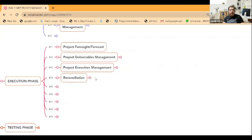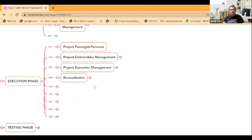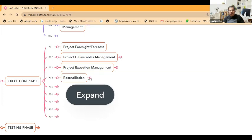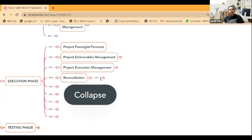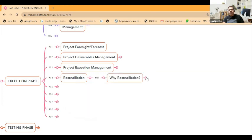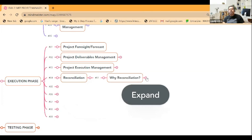Another parameter playing a big role is reconciliation. Do you know what reconciliation is? Reconciliation is very important because periodically you have to check your material stock. You need to do this exercise after one month, two months, or three months to check your material stock. Reconciliation, like cables - suppose you purchase 400 meters, sorry, four kilometers of cable.